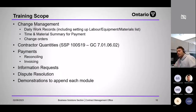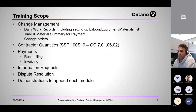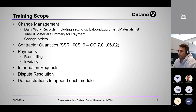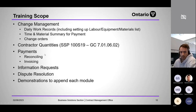Change management covers: daily work records; time and material summary for payment, which DWRs lead to; and change orders — we'll talk about the four bases of payment for change orders. We'll also cover contractor quantities — formerly item postings — which contractors use to submit quantities weekly based on 100S19, a recent change based on Construction Act changes. Then payments, reconciling and invoicing, information requests, compensation requests, and dispute resolution.